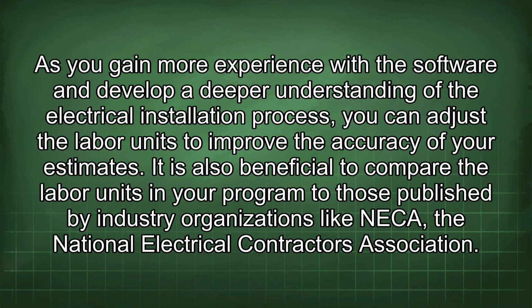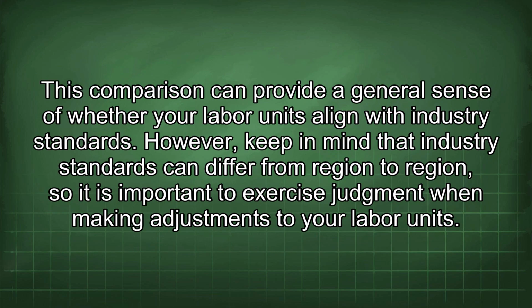It is also beneficial to compare the labor units in your program to those published by industry organizations like NECA, the National Electrical Contractors Association. This comparison can provide a general sense of whether your labor units align with industry standards. However, keep in mind that industry standards can differ from region to region, so it is important to exercise judgment when making adjustments to your labor units.